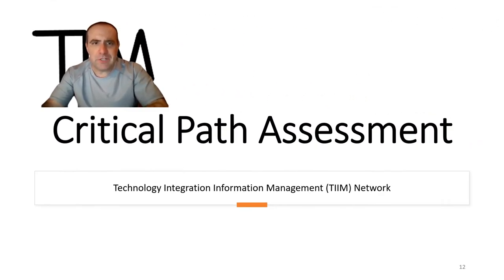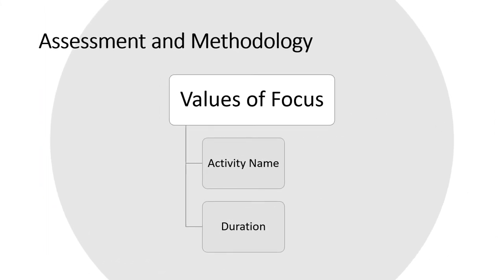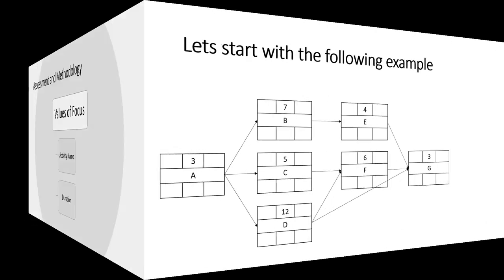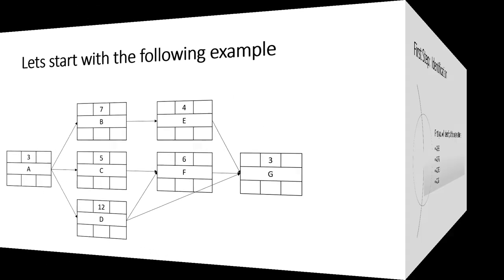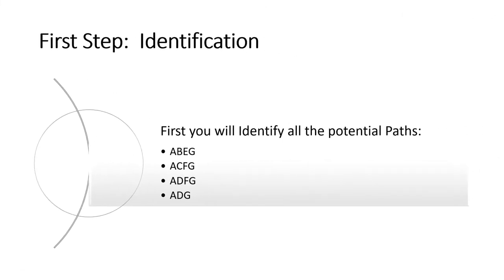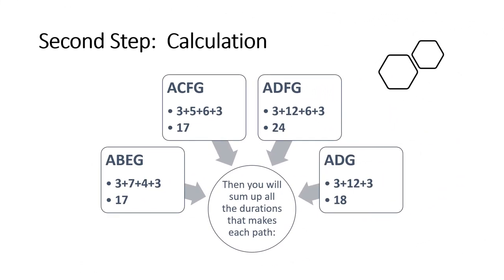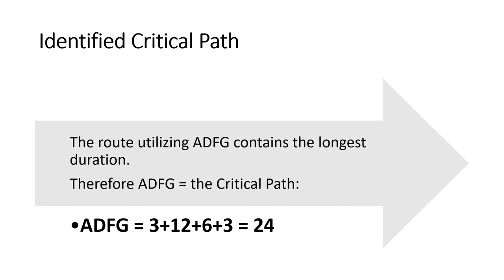Now that we have gone over all the initial definitions and components of the network diagram, let's now identify the methodology in assessing the critical path. For the purpose of this approach, let's focus on the values of activity name and duration. This slide displays the duration and activity name as well as the areas of divergence and convergence. First, identify all the potential paths. Second, calculate the sum of the durations in each path. The critical path will be the path identified with the greatest sum. In this instance, it is ADFG.